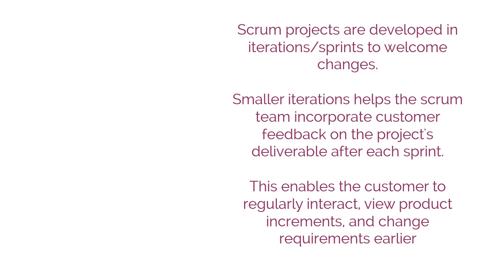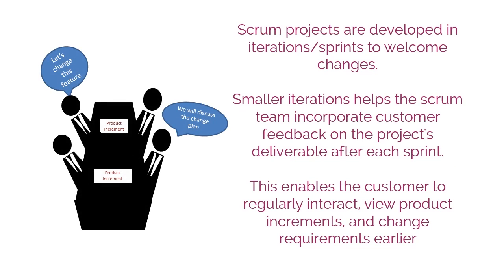One of the major reasons for Scrum projects being developed in iterations or sprints is to welcome change. Smaller iterations help the Scrum team incorporate customer feedback on the project's deliverable after each sprint. Thus, they enable the customer to regularly interact with the Scrum team members, view the product increments as they are ready, and change requirements earlier in the development cycle.